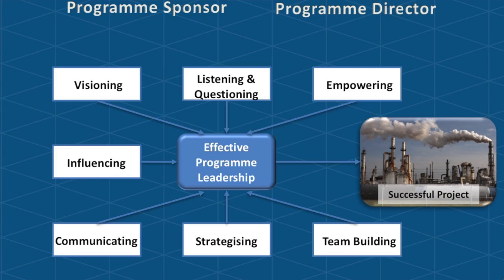So once things are clear, a sponsor should not get down there and interfere with what happens in projects, neither should a program director. The scope is frozen for a project, so empower the guys. And you keep on tracking on a program level what is going on there, and when you see a red flag, you can go in and support with those resources on the side that are general supporting resources to the various projects.